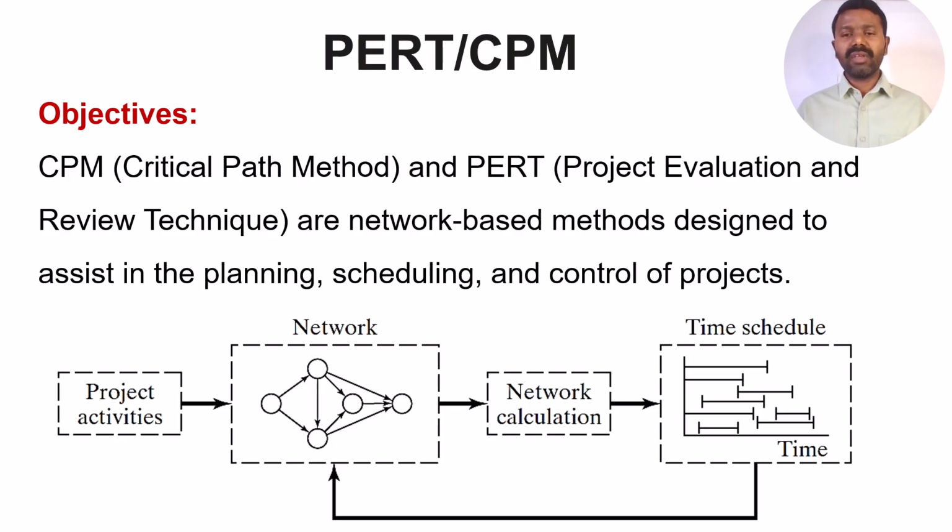that is the construction of a bridge. This bridge consists of procuring the material for building it, then steel work and concrete work, and finally the testing. All these activities depend on one another. There are some works which can go in parallel, and procurement keeps going on, as you keep procuring the material required for construction of the bridge, so you will be doing some other work in parallel.